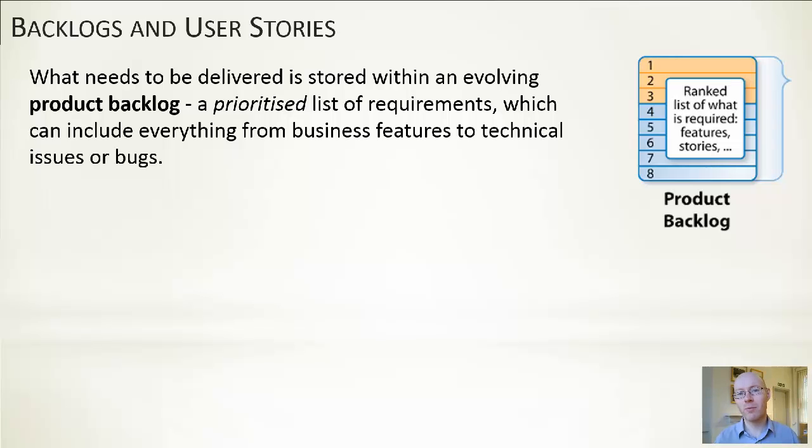Now, importance here can be in terms of essentialness to it. It can be in terms of because it is a prerequisite for some other things. It can be in terms of it would be good to see this early because then decisions can turn on it. So when we're thinking about the importance of something, that can be a rich definition of importance. Nonetheless, though, the items we have in the backlog are prioritized, and that is quite important. That's something that the product owner is largely responsible for facilitating.